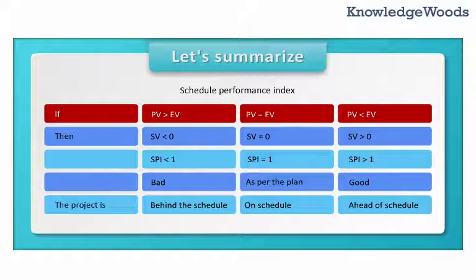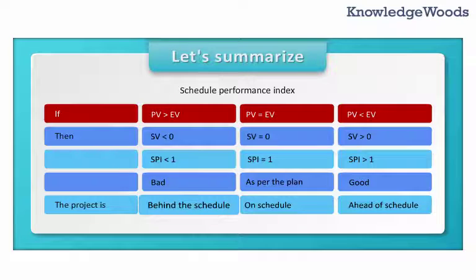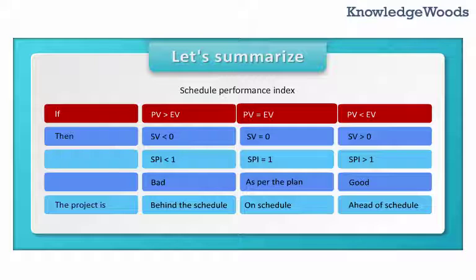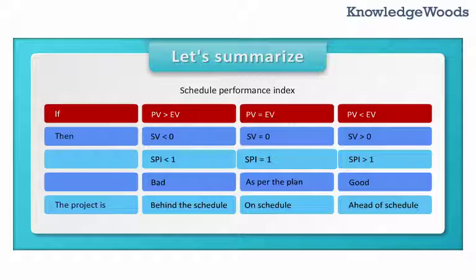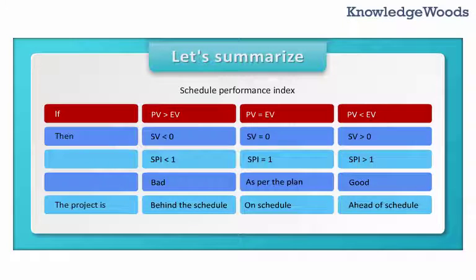Schedule Performance Index also has three situations. If planned value is greater than earned value, schedule variance is negative and SPI is less than 1 — a bad situation meaning the project is behind schedule. If planned value equals earned value, schedule variance is 0 and SPI equals 1, meaning the project is on schedule. If planned value is less than earned value, schedule variance is positive and SPI is greater than 1 — a good situation where the project is ahead of schedule.